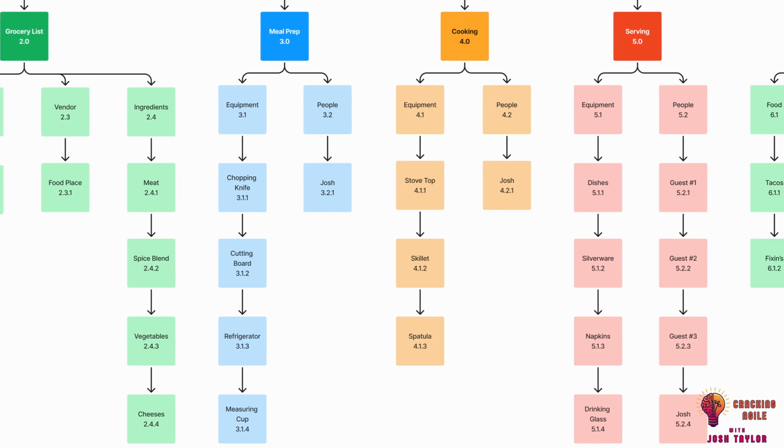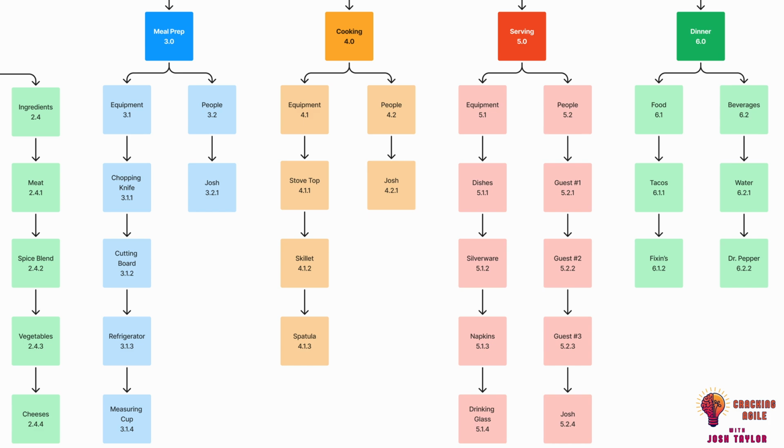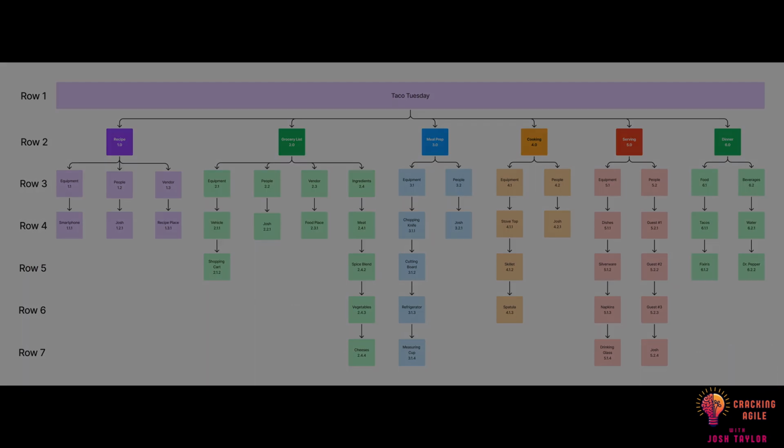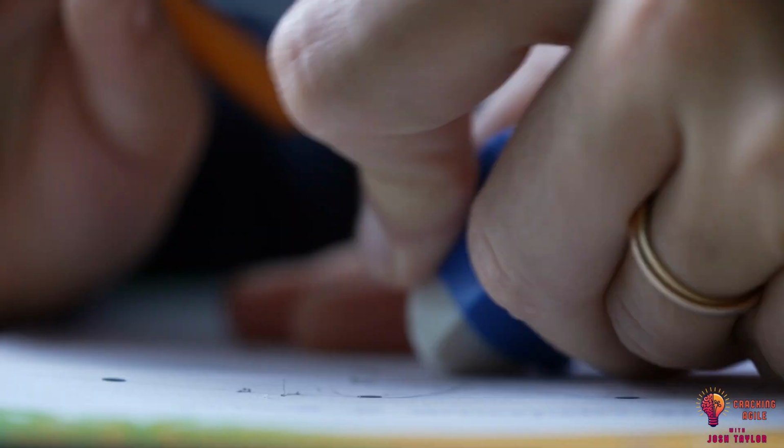Estimating resources is a lot more complex than this in a real project, but it should help you gain a mental image of the necessary steps that you'll think through when in a real-world project. Here's where the cone of uncertainty will rear its ugly head again. You may or may not be able to fully identify all the resources you'll need or how long you'll need them early in a project. That's okay. That's why it's critical that you remain fluid and bounce back to the estimate resources process when you identify something new that requires materials or people.